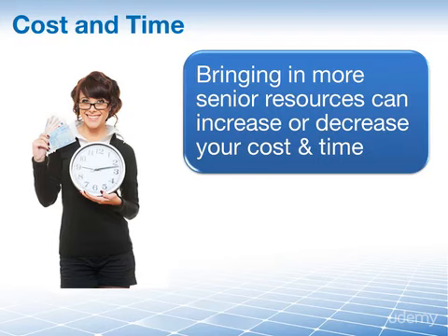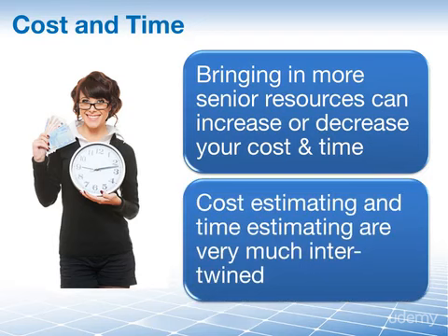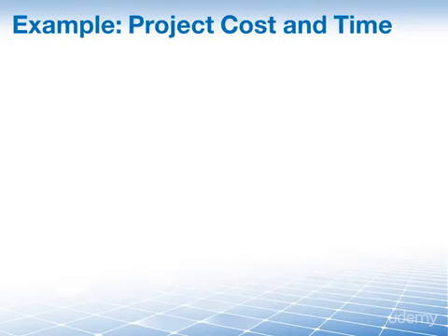In other words, the type of resources that are assigned to your project will define the time it takes to finish a task. And this duration not only defines our schedule, but it is also a major factor in cost. Cost estimating and time estimating are therefore very much interrelated. One cannot change without the other also changing. You won't be able to bring a resource on for 2 weeks and pay her only for 2 weeks of work, right? Here's an example of how interrelated cost estimating and time estimating are.